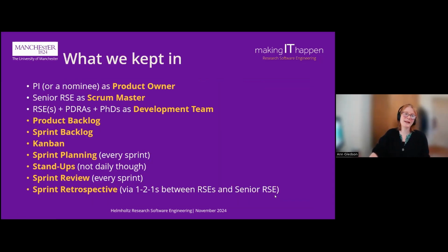Okay, so what have we kept? What has our RSE team kept in? The project PI, the academic PI, or some nominee, maybe a PDRA or a research fellow, acts as the product owner. A senior RSE, as I said before, acts as a Scrum master. RSEs and PDRAs and PhDs form the development team.